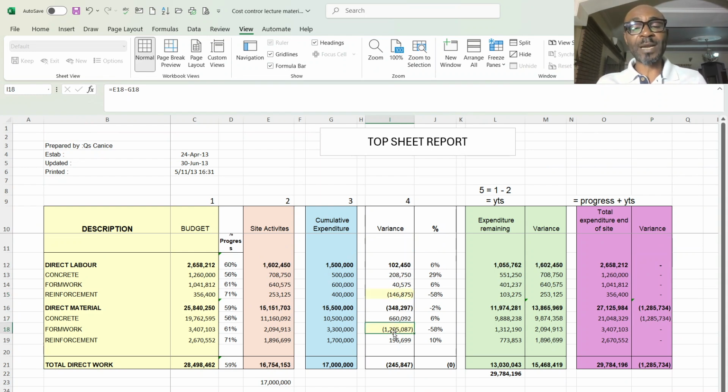If it is unacceptable to them, why will you be losing 1,200,000? What is the problem? You would need to go back and check where you have got it wrong. The one that is an outright loss, if it is not a fluctuated contract, is not your making. But if there is no contingency kept anywhere, you have not made provision for contingency for such a situation, and it is not a fluctuated contract, then you run into some difficulty.